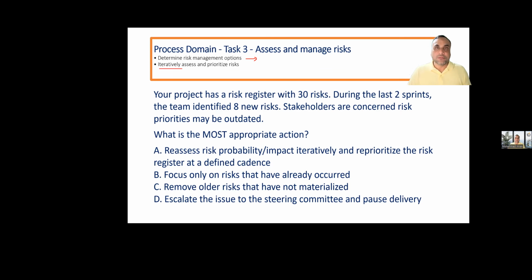So that was the explanation of risk. Identify the risk and prioritize the risk, meaning the higher risk should be addressed first so we can eliminate it. Like in Agile, we keep the user stories which have the highest return on investment and the highest risk on top, so value will be increasing and risk will be decreasing throughout the project. Now you have the understanding. Let's solve the questions and improve our learning gaps.